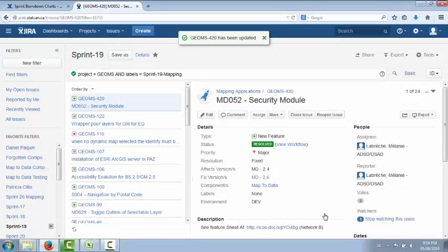Typically, what we'll do is we'll wait until the end of the feature to act on those items as resolved. So we won't send them to clients directly. We'll wish to package them and bundle them together as a release, which we'll do at the sprint review meeting. So that's the next meeting that we'll cover in more detail.